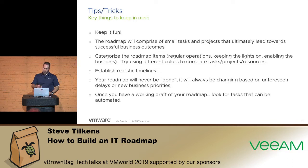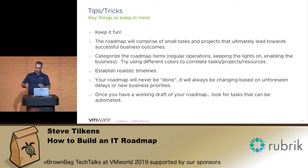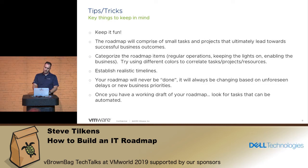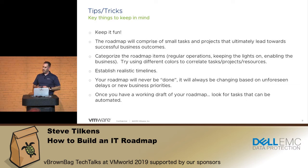Once you have a working draft of your roadmap, look for things that you can automate or improve through general process improvements. If your roadmap has three months allocated to do firmware upgrades on 12 hosts, that's a red flag — why is it taking three months? Look for opportunities; they're going to be visual and you'll be able to identify them faster. Maybe there are tools or processes you can put in place to improve things.